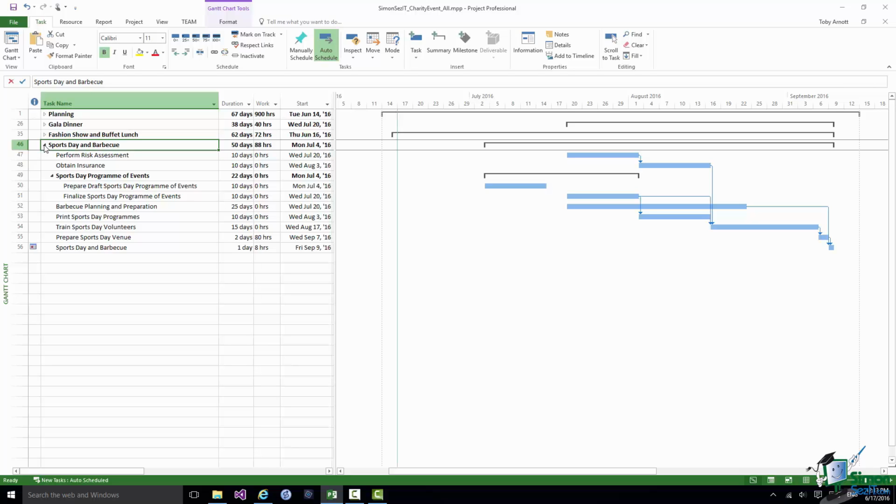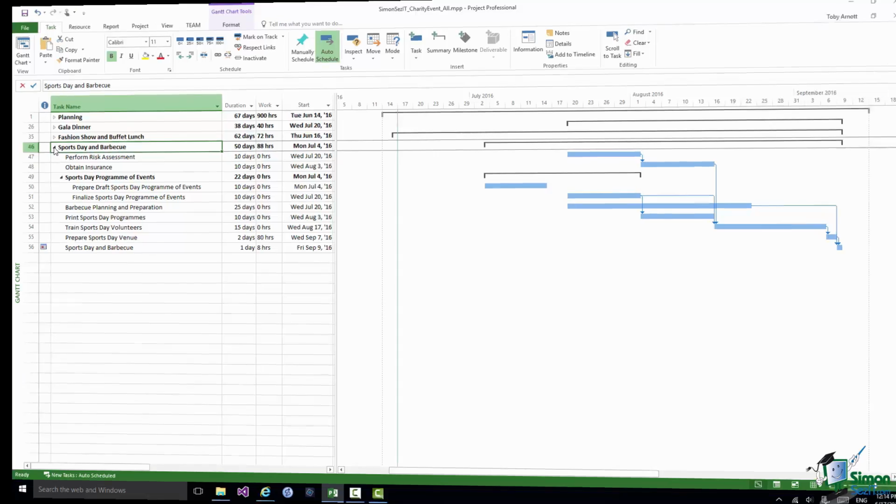And this is a typical scenario, i.e. one where we need to share resources between a number of projects. Now the added complication here, and again this is typical, is that the 4 projects, although we want to separate them out from a file management and MPP file management point of view, they are not independent. These projects have various links between them, and we need to make sure that these links are set up correctly, understood and respected by all of the projects.